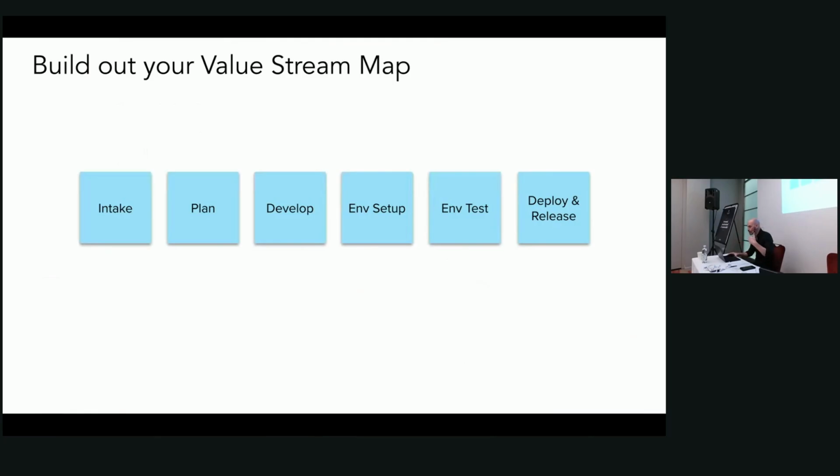We don't want to be dragging people through this process. So we lay out the stages of the process, and we add these measurements. On the top, you have cycle time, so how long did it take to do this activity? And then below, you have the delay, which is how long passes between activities, between the handoff.